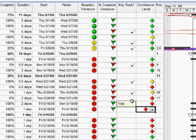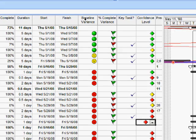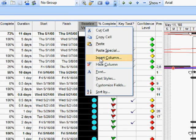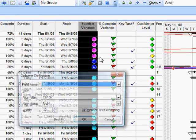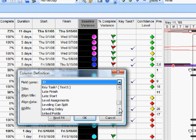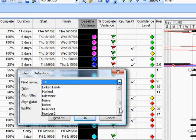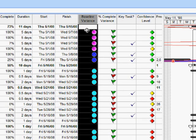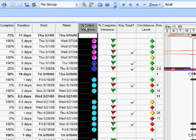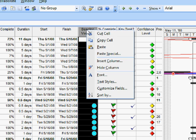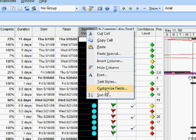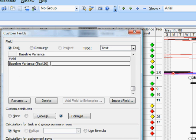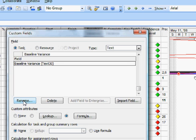So how do we go about creating these? The first thing we do is we insert one of the existing fields and you can always insert a field by right clicking, clicking insert column and then choose one of the many fields that are available. And if you're going to customize then choose maybe one of the number fields or text fields. Once it's inserted you can then customize the field. So let's assume in this case, and what I did there was I right clicked, now I'm clicking customize fields. The field that we inserted was text 30 so what we do first is we rename it to be baseline variance.